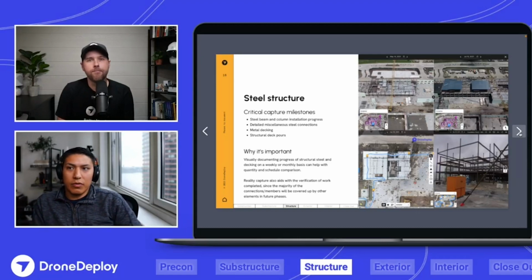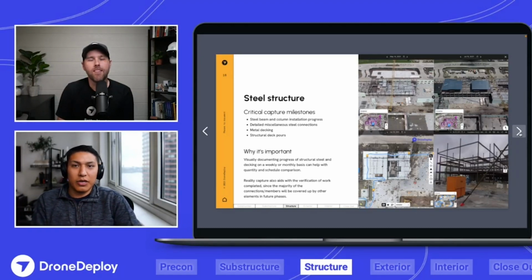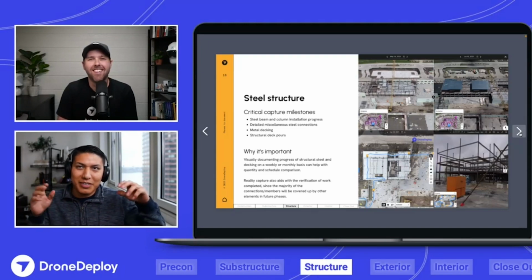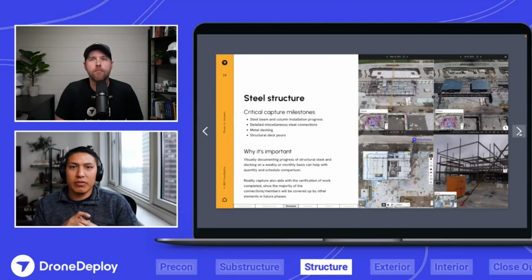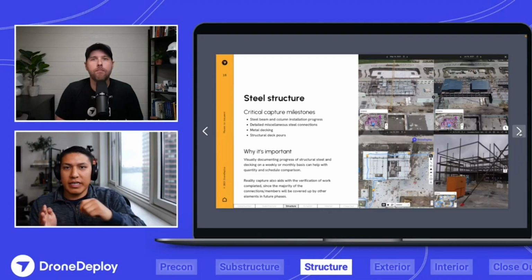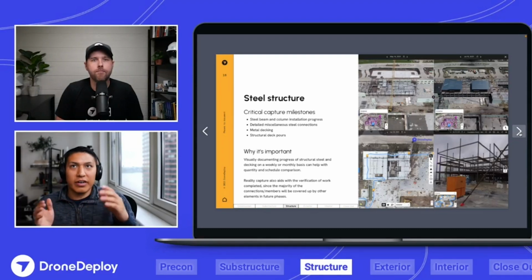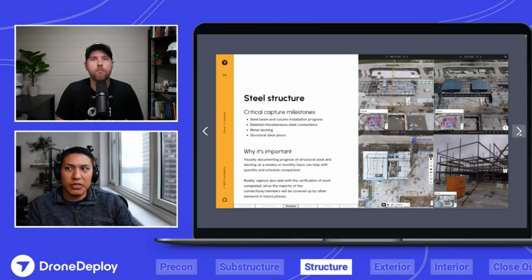So, classic first thing I was told I had to do. Well, not told, but my first task when I first stepped on site was go track how much decking is getting completed. Go print out the plan, get a highlighter every day, and mark a box of square footage roughly. All right, I guess they're on this column line. I'm doing this, and I was like, okay, great. This would be so much easier if I could just have a photo from above.